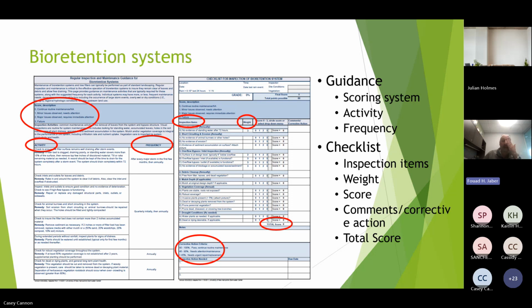Now, the other thing you can do here in order to address the cost of maintenance, the minimum life cycle cost, is as you go back to the office, with time, maybe the first time you need to do some work, call some different groups to estimate the amount of money you need for these different solutions to these problems. Once you have a list of the costs, when you go back to your office, you can estimate the cost of maintenance or repair needed for that bioretention based on the different repairs required by your form.